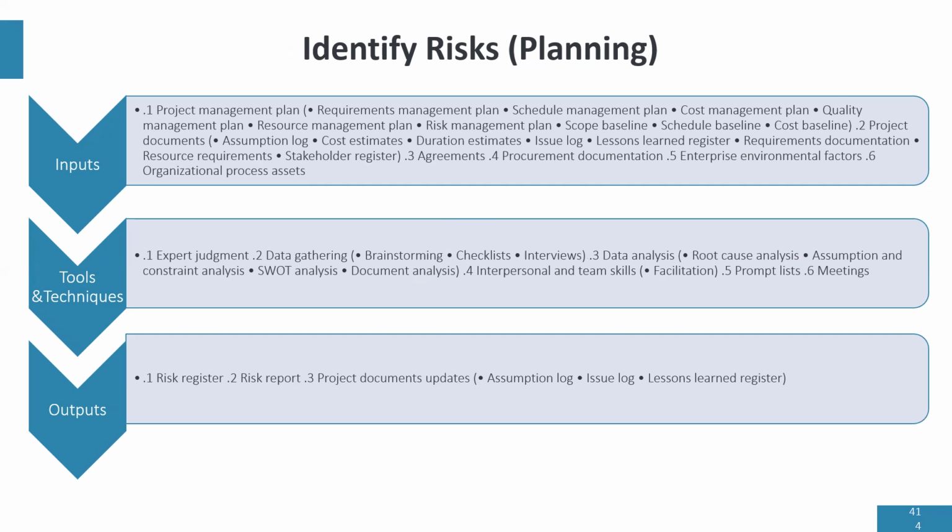Now, let me give you an example. So when I was managing the project for World Remit, it happened a few months after NSAS, and we were doing risk identification, and one of the risks I identified, of course, was, is it possible that if we're having any youth engagement program that police can maybe try to disrupt? Now, that's an example of risk identification.